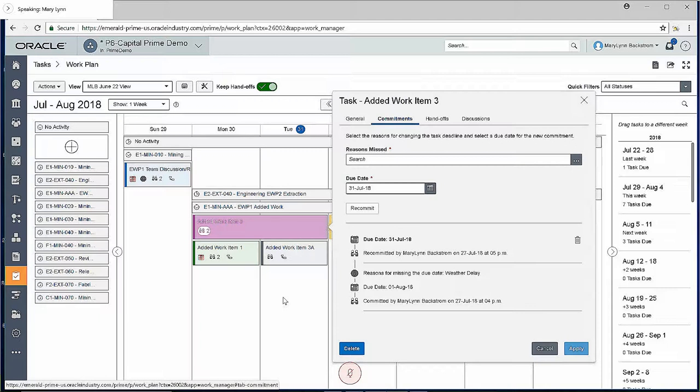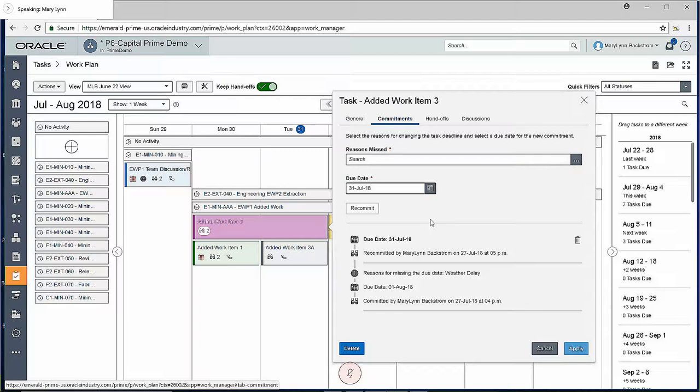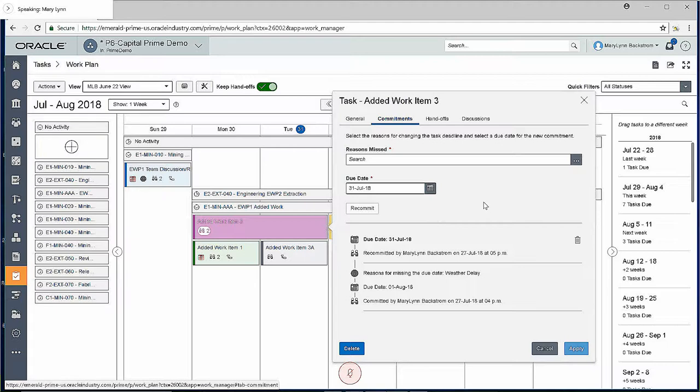As soon as they do that, if the task gets missed, there are reasons the task is missed available here. And you can recommit at that point. We'll take a look at that a little closer in a minute, but you can track what is actually causing commitments to be missed. So if you've got something that's contributing to a lot of them, you've got the information, you can take a step and do what you need to do to correct it.